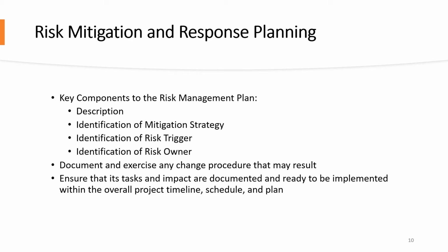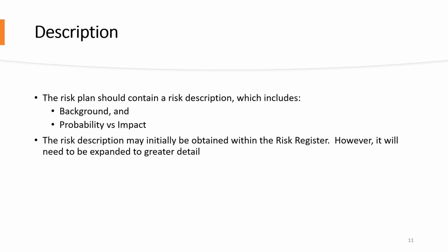Now let's break down each of these topics within the following slides. Description. The risk plan should contain a risk description, which includes definition of the risk and its background, how and when this risk is identified, and what makes this a risk. It should indicate the likelihood of this risk occurring, what factors make it more likely to occur.